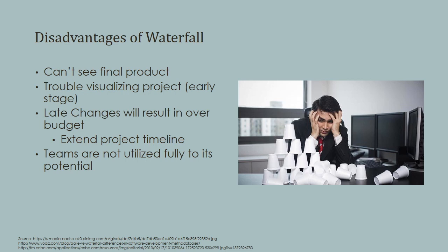Teams usually spend a lot of time gathering requirements during the initial stage, and there are chances where those requirements could change once the team starts coding and developing the product. So there's a high amount of risk and uncertainty prevalent in waterfall methodology. Another disadvantage is any late changes made to the initial requirements will also result in the project going over budget, as well as extending the project timeline. This might also delay the other projects that are in line. Once again, there's a good chance that customers might not be satisfied with the end result.